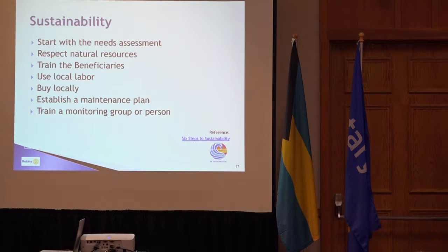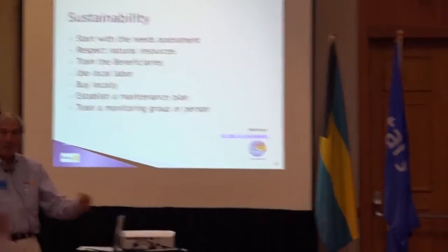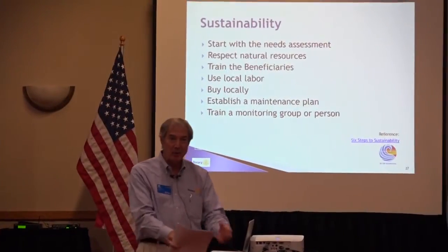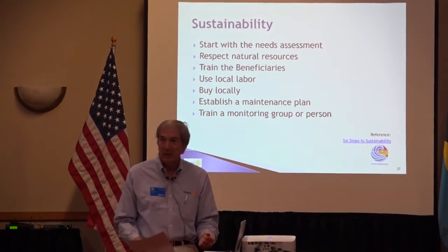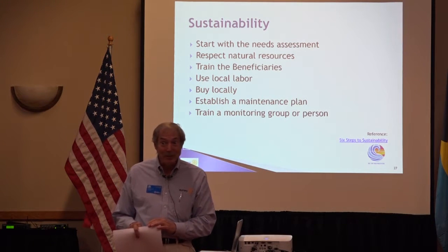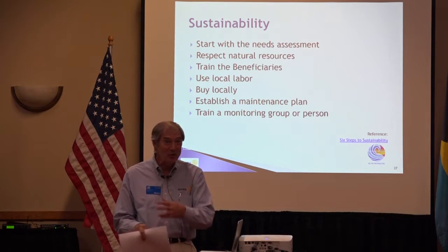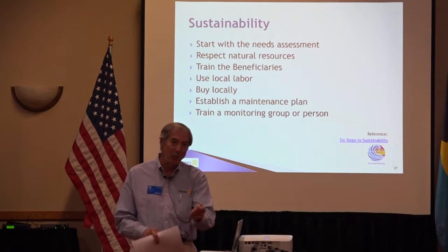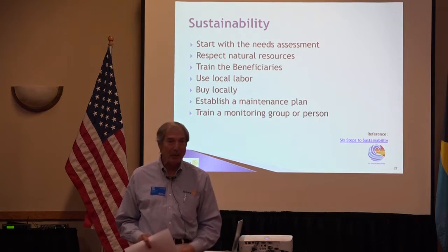If you say, I want to get water and it comes out of this little spring in the ground, but a whole lot of people are using it, you've got a political problem to figure out how you manage that spring. Today, everybody goes there and whoever's in line first gets to take water until his bucket's full, right? And now you want to pump it somewhere and fill up a tank? I'm sorry, you're in trouble. You can't just do that, because the first person who can't walk there and fill up his bucket is going to break your pipe.